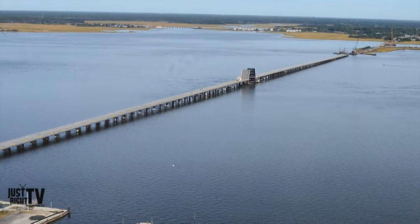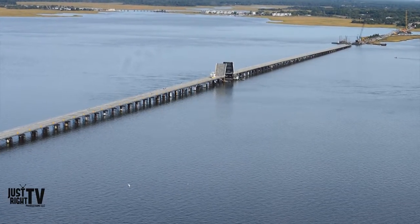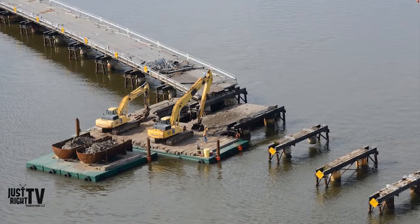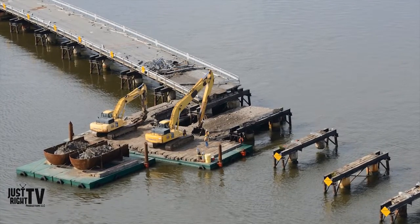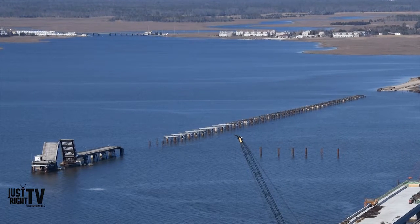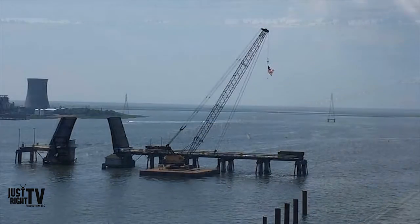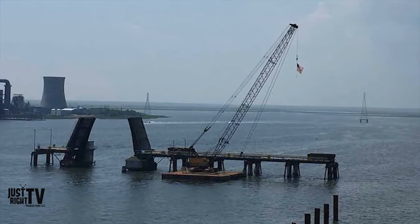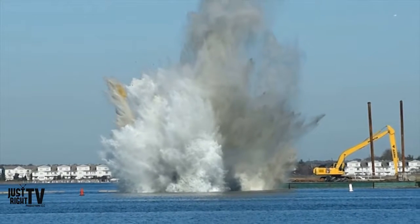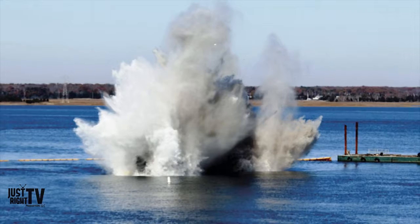The piers were spaced at 40 foot. There were old concrete filled caissons on top of wood pile. So we hammered the deck down on the barges. We took off old steel retrofit bents, and then we pulled the caissons out by snapping them under the mud line with an excavator while a crane was hooked to it, pulled them out with a crane. The bascule span in the center had two dog bone shaped piers. It was concrete filled cofferdams essentially, which we drilled and shot, used explosives to rubblize the concrete and then pick it out with a clamshell on a crane.